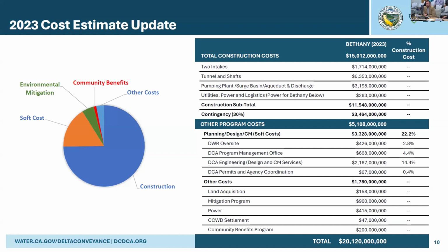We also looked at the percent of construction costs related to those labor and soft cost aspects of the estimate. The board will recall back in 2020, we worked the other way. We used benchmarking with large scale projects to develop high level percents for these labor costs, and then worked our way into the labor costs in that direction. For this estimate, we've worked our way bottom up for those soft costs, and then we're calculating the percent to provide context so that we can compare it with the old estimate. But we did it in the reverse direction. I hope that translates here.